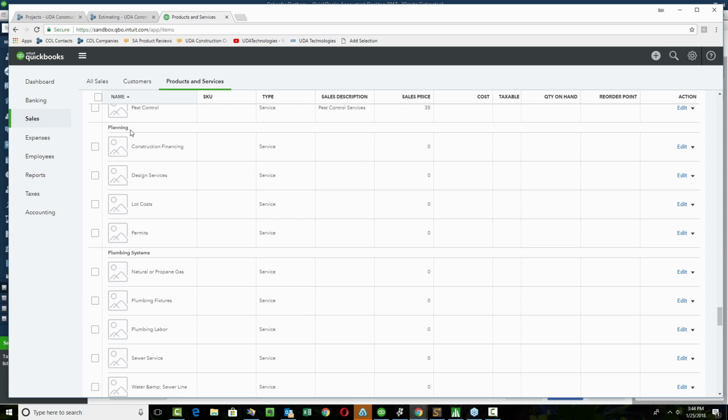If you were to enter a 2-digit numbering system or use something like the CSI numbering system, I know Judith Miller from Remodeler's Advantage used to recommend similar things. You put these items in there and you work with those as well, and the numbering system will make sure that the items and the categories in QuickBooks Online always follow the same order as, hopefully, your estimate template does in ConstructionOnline. So again, quick little plug on that one too.